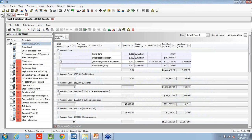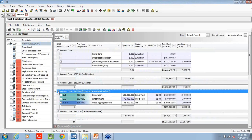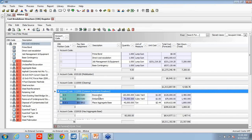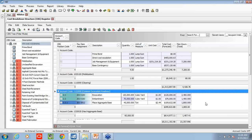So as I switch my view, I'm bringing in my account code or my job cost code. I might want to just focus in on all the items that are assigned to certain account codes or cost codes. So when I load up and we do our data transfer from HD to viewpoint, we would expect to see certain job cost codes created, certain costs associated with that job cost code, man hours, equipment hours, et cetera.